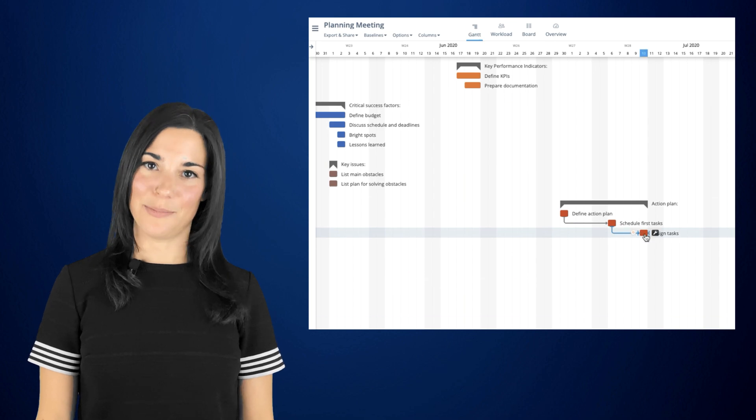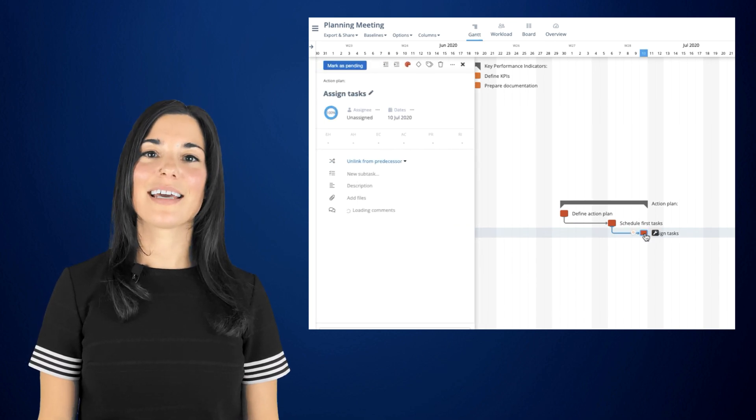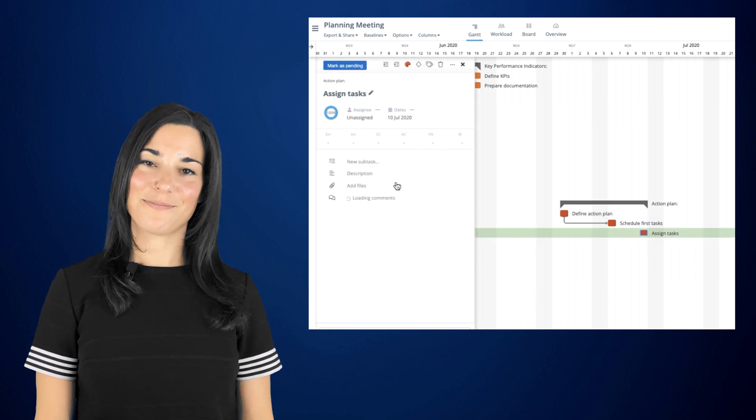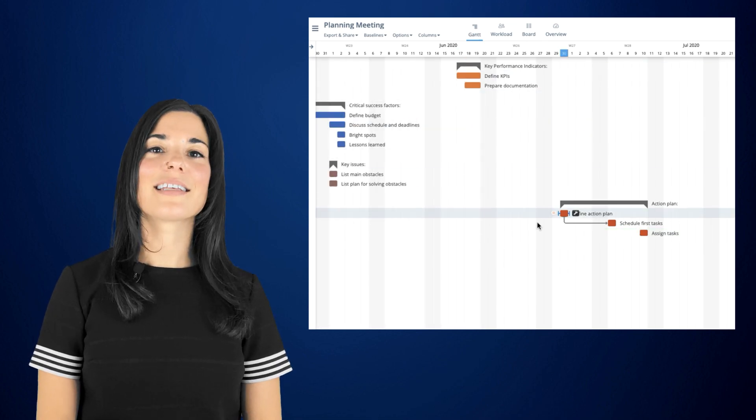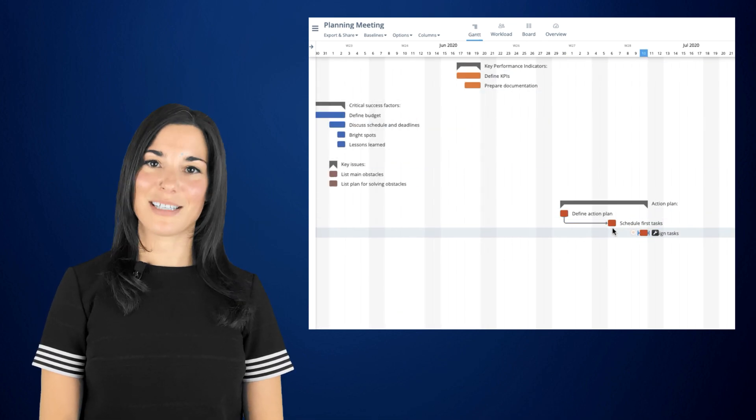In case you want to delete a dependency, you can click on a task and then select unlink from predecessor. The gray line that indicates the connection between the tasks will immediately disappear.